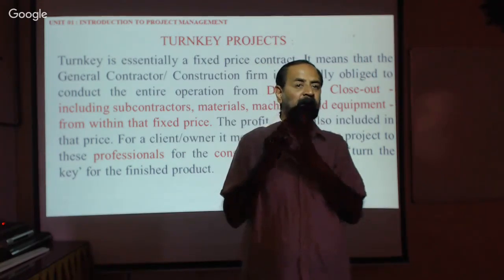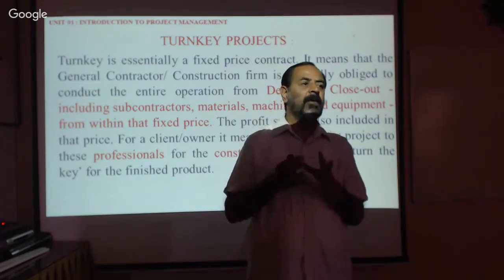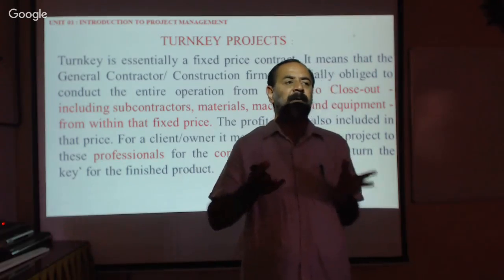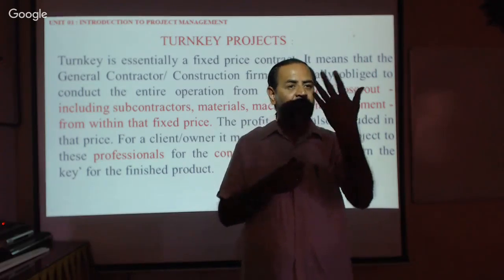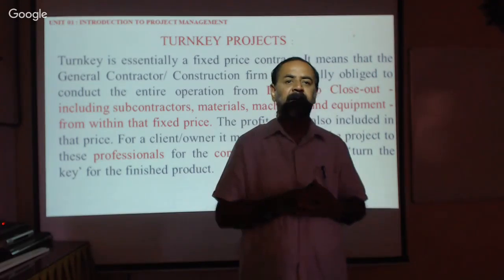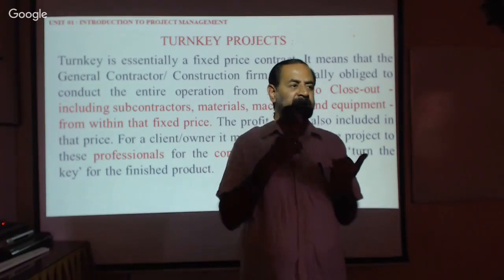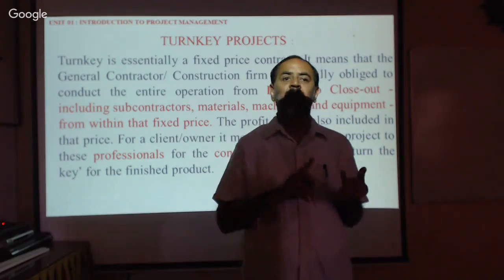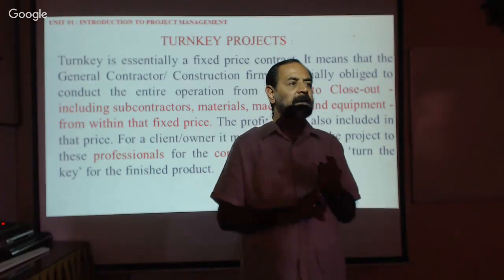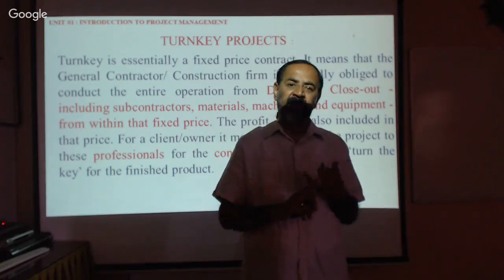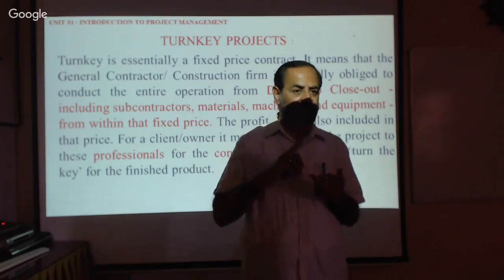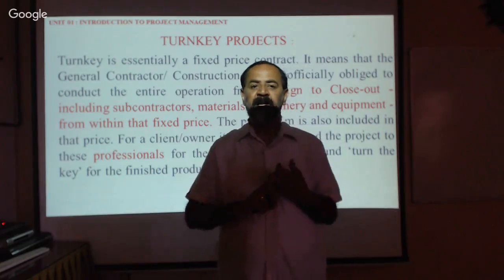The government is only proposing, we want a road. We want to build a four-lane road from Mangalore to Bengaluru. That is, the government is proposing. Now, who is going to prepare the other things? We need to conduct the survey from Mangalore to Bengaluru, 305 kilometers. Then we need to prepare the designs, the drawings, the bridges, the flyovers, and the cross drainage works.